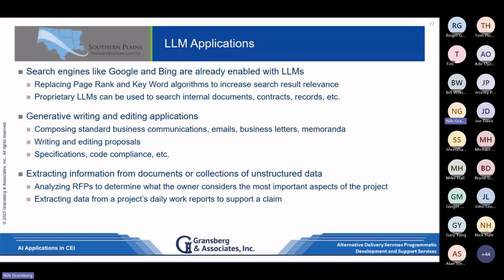I don't care what the structure is as long as it's sufficient. I'm not going to tell them it has to be tilt up concrete or it has to be structural steel. I'm going to say I want the structure to be fully enclosed and insulated, and describe how it performs. LLMs can help you with being able to convert prescriptive specs into performance specs or into performance criteria, and they can learn how to do that.